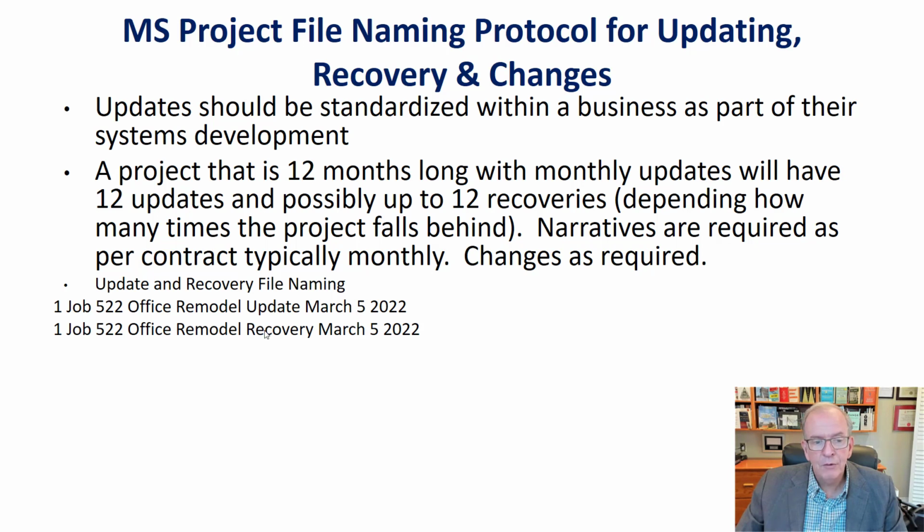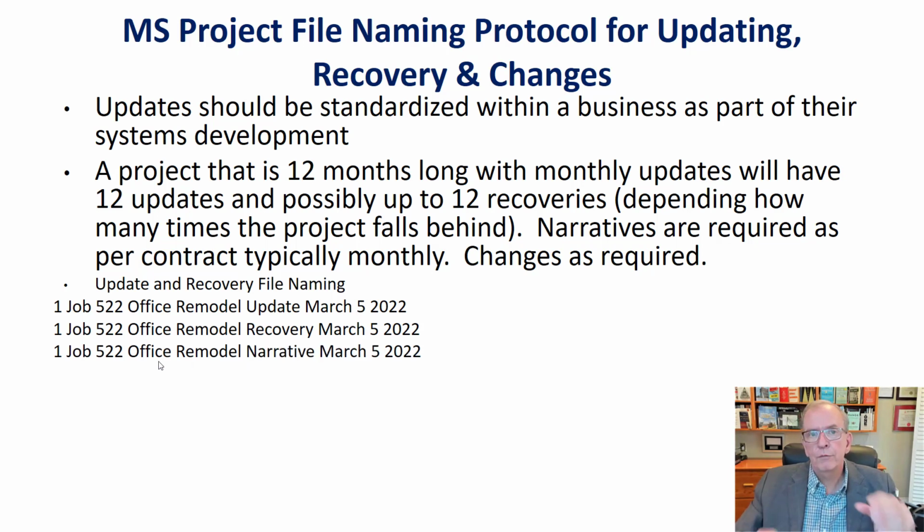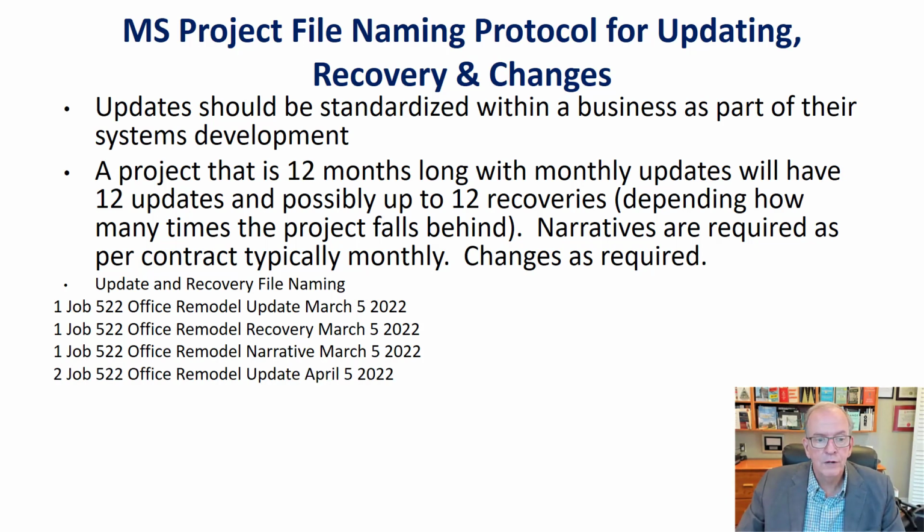Now we've got the update, now we've got the recovery. And if I was using Microsoft Word to do a narrative, like your statement or executive summary of what happened in the last month, it should very clearly say whether you're ahead or behind, why you were delayed, how many bad weather days occurred if it's a construction project, these types of things in the narrative. But again, now it's all in the same folder, easy to access, and they're all based on the same numbers. If I wanted to open up the 3 of them at that time, I could see that. Because don't forget, you've got a 12-month project, right? That's over a long period of time. It's nice to be able to access just different components to look at and review different things.